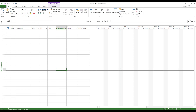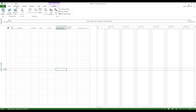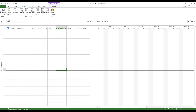That is the Quick Access Toolbar. You have tabs — in the ribbon, you can see different types of tabs. The Task tab includes task rate, assign, summary task, milestones, task percentage completion, and inspect resources. If you want to add resources, you can add staff, assign tasks, and level resources — sometimes staff are over-assigned, and you can do resource leveling. The Reports tab has general standard reports and custom reports that you can create. We will see those in later chapters.